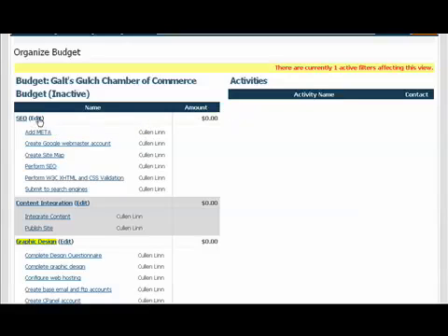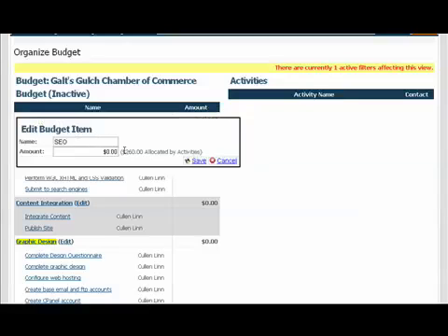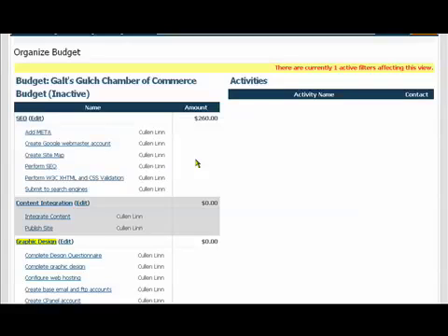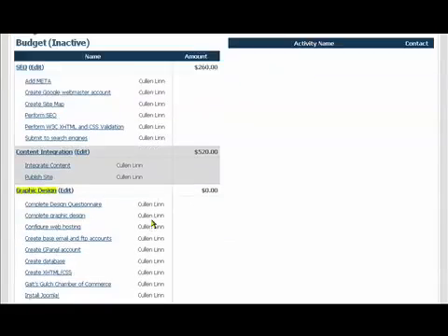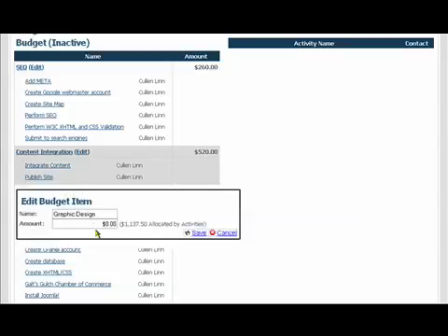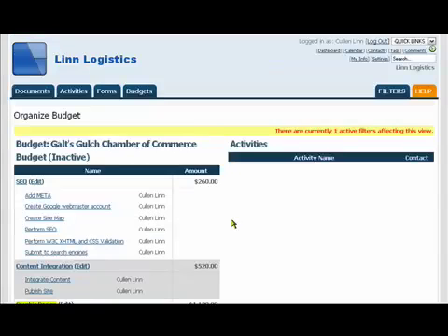Next, I've still got a zero budget and I want to calculate it based off of the hourly rates times the time that I've got invested in activities beneath. So that's what I'm doing here. You'll notice that it auto-calculates a value for me based on the hours assignments and my billing rates. I then assign a value that's either that, or I can round up or down or use fudge factors, if you will, to get the numbers where I need them to be.